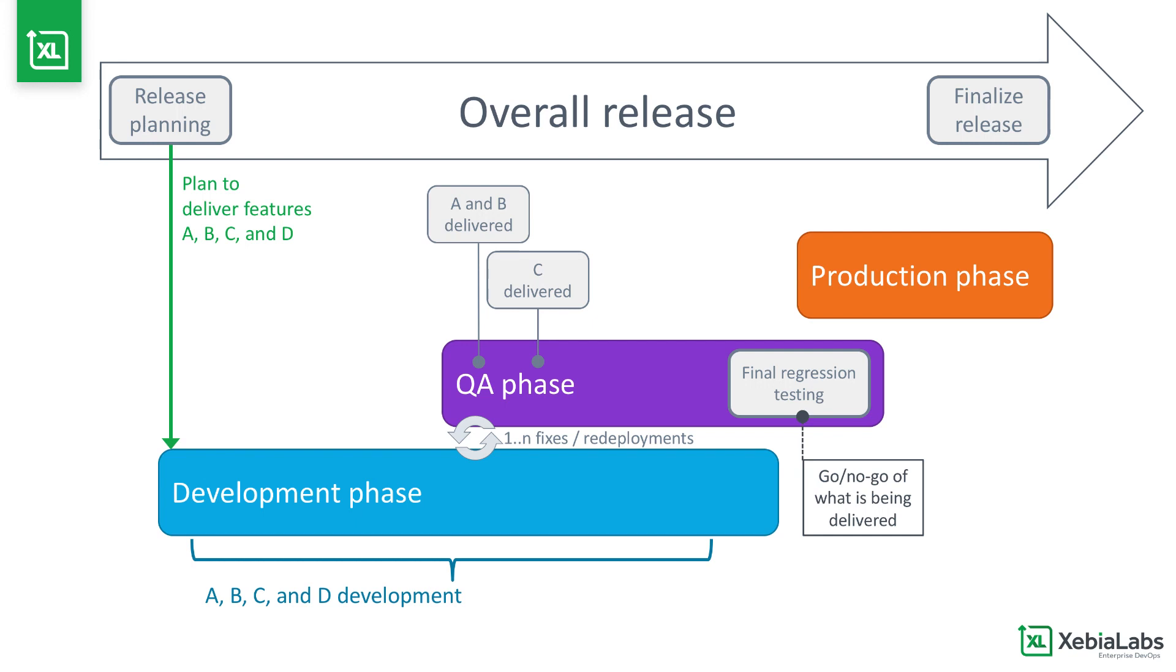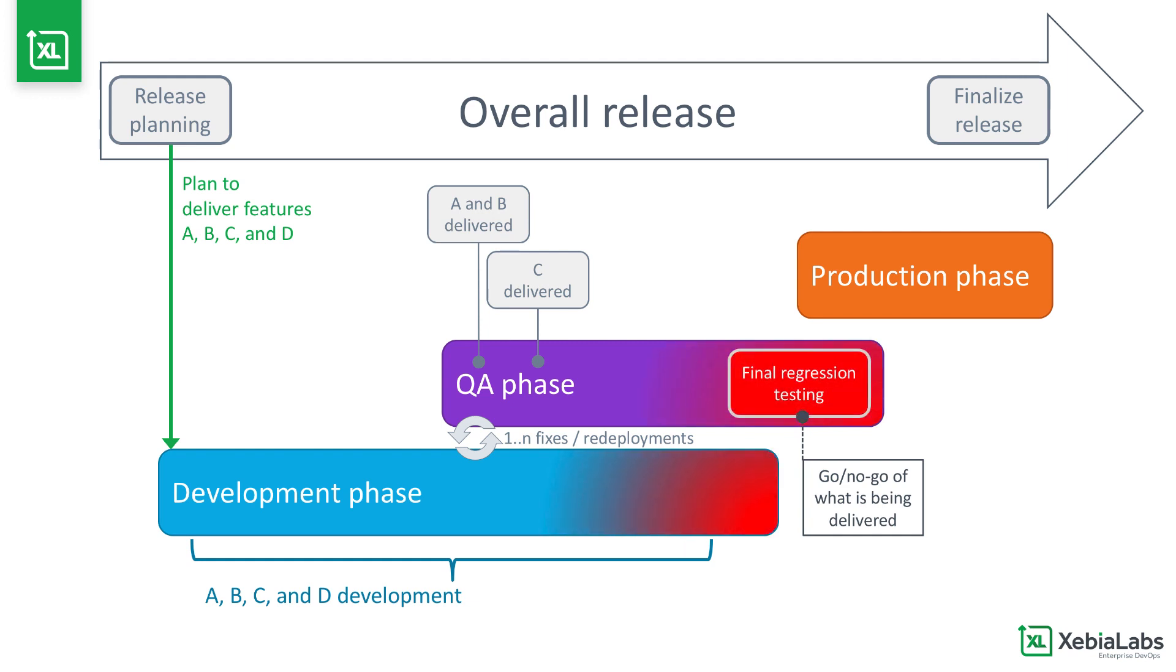This staggered delivery of features affects test availability windows, testing plans, regression testing strategies, but most importantly, it impacts project timelines. The calendar doesn't move, so delays in the iterative development QA cycle have a domino effect on projects that have a fixed planned delivery date.